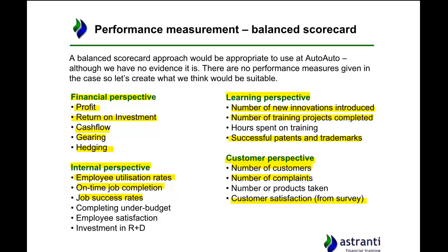For example, if you've got a project that is going to cost £1 million a week to do, and it takes 2 weeks, and when it's finished, it's commercially viable to the tune of 3 million Upland dollars. So cost 2 million and made 3 million. If that overshoots and takes 3 weeks at a cost of £1 million Upland dollars per week, suddenly it's no longer profitable. It'll break even.